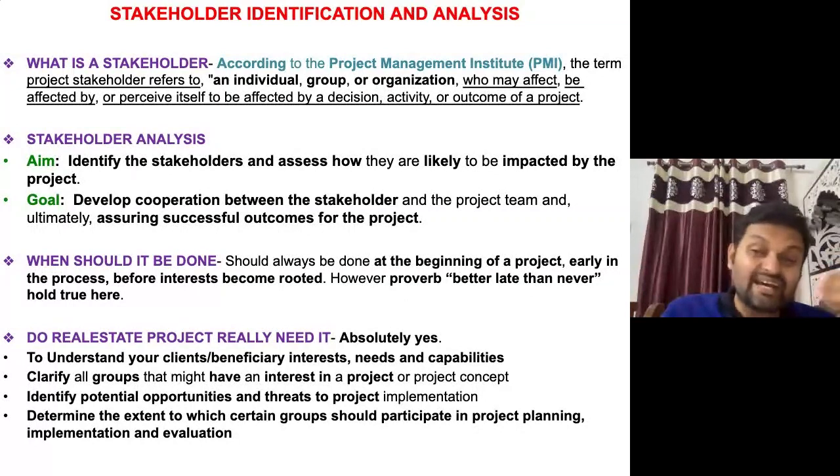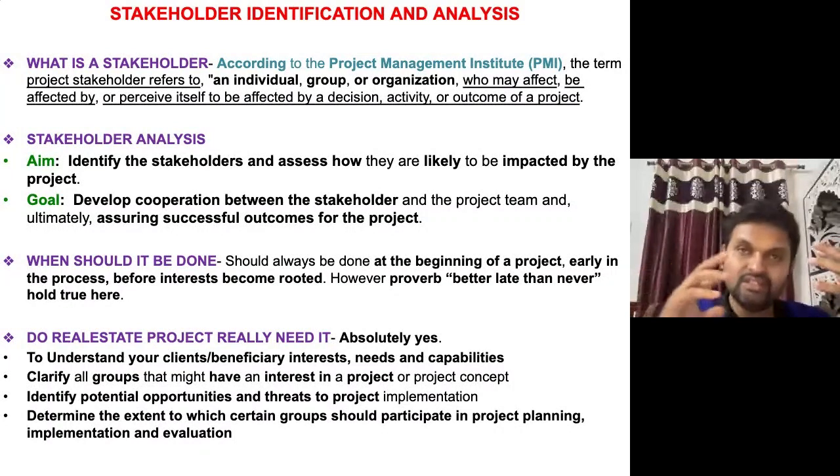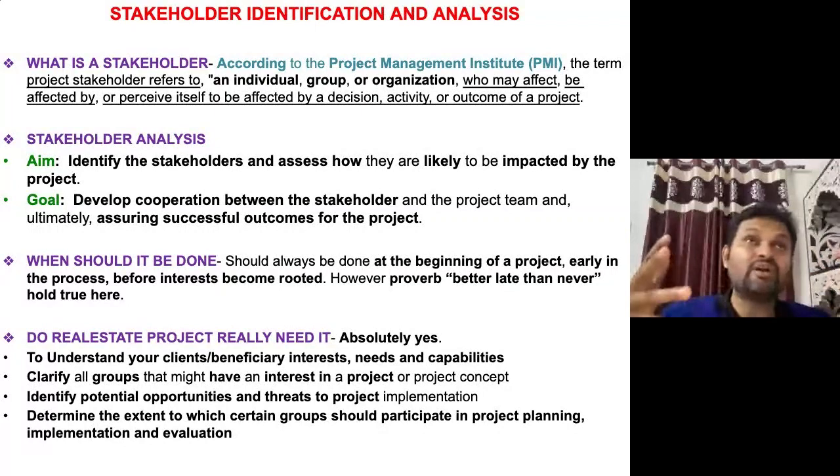Now, when should stakeholder identification and analysis be done? The important thing is at the beginning of the project, as early as possible, right? But that doesn't mean that once your project has started you can't do it. Definitely you can, but the earlier you start, the better you are able to manage. It is like feeling thirsty and only then digging a well; it does not make logic, right?